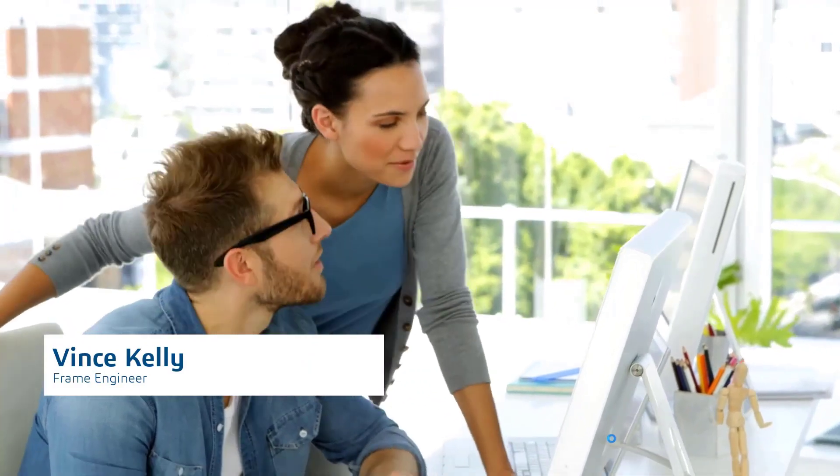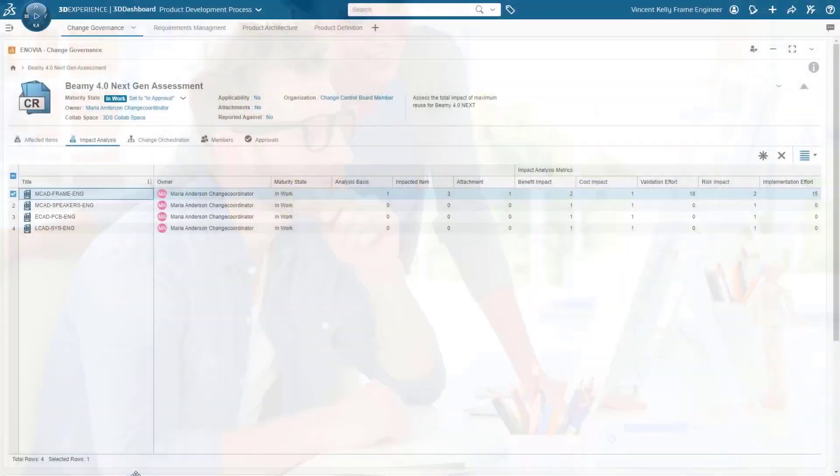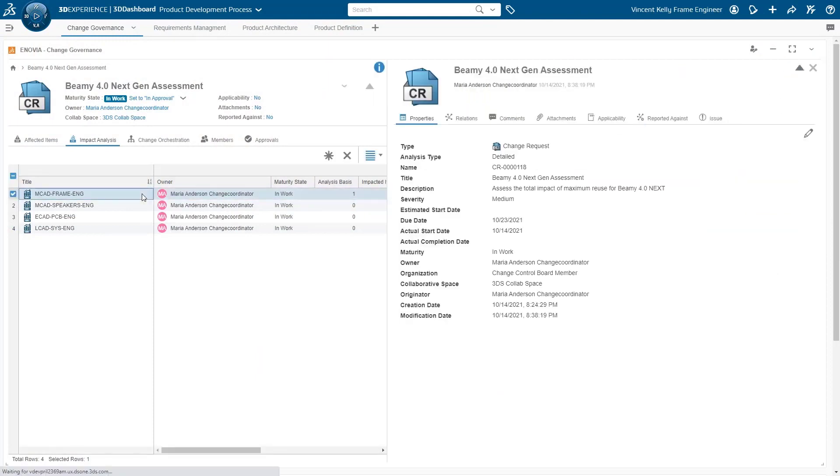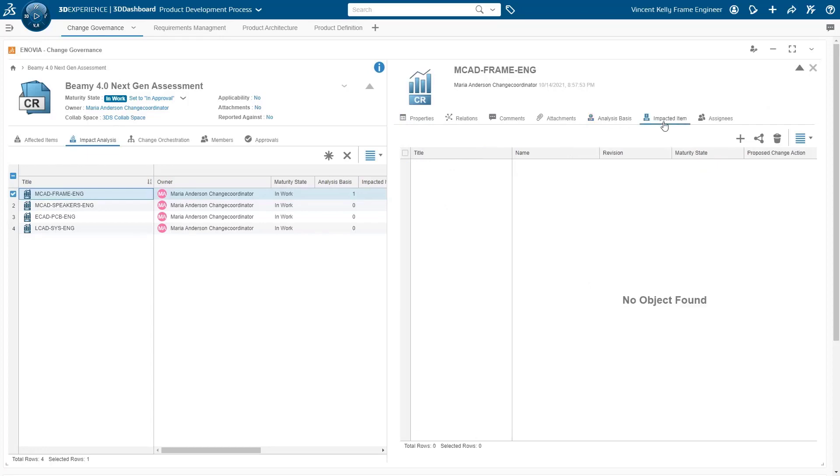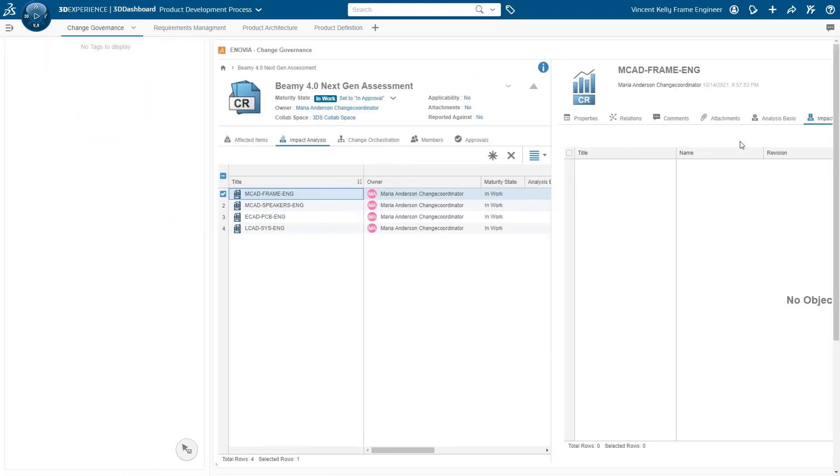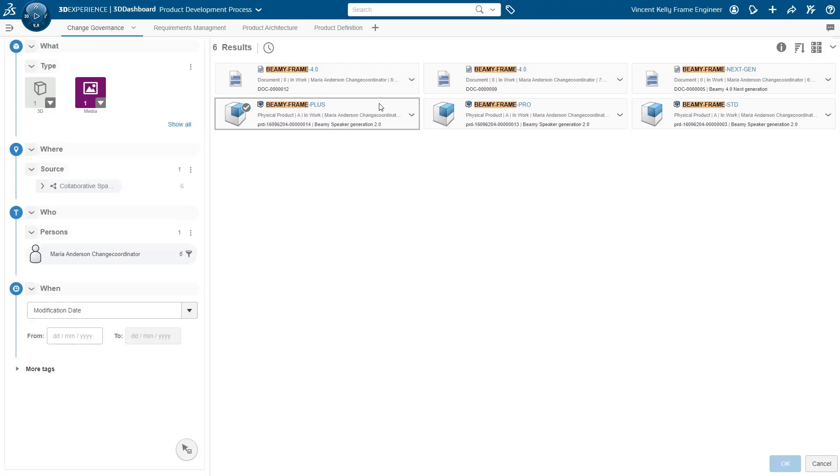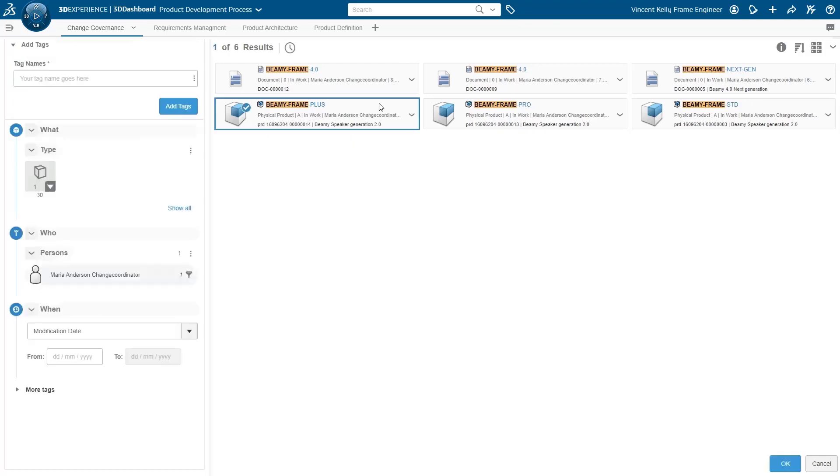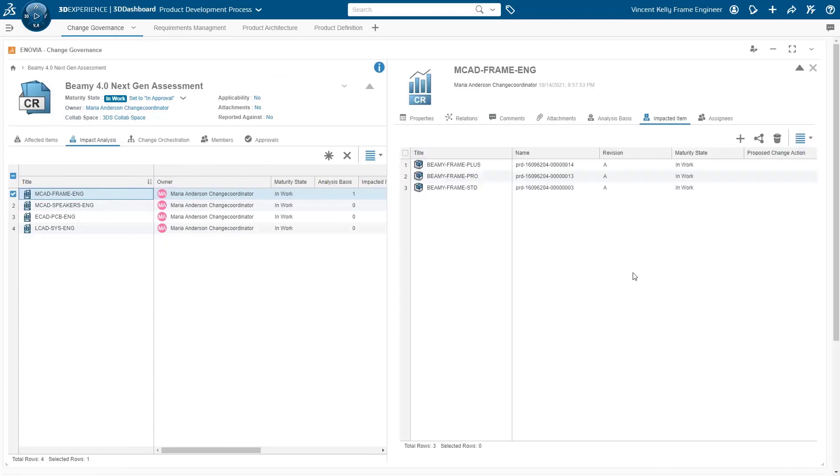The functional teams investigate the impact and effort for their organization. Possible impacted items are added to the change request to help understand what items could possibly be impacted by the change. This will also provide functional leads the ability to navigate the affected items to easily identify their impact across other organization functions.